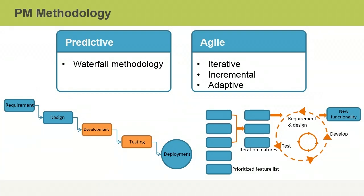Some projects use the agile methodologies. Agile projects are characterized by iterative and incremental life cycles. The phases overlap with one phase starting before the previous phase finishes. This can speed up the project but may also result in rework if issues are encountered. The scope is tentatively determined early in the project and then clarified as the project proceeds. This is called rolling wave planning.